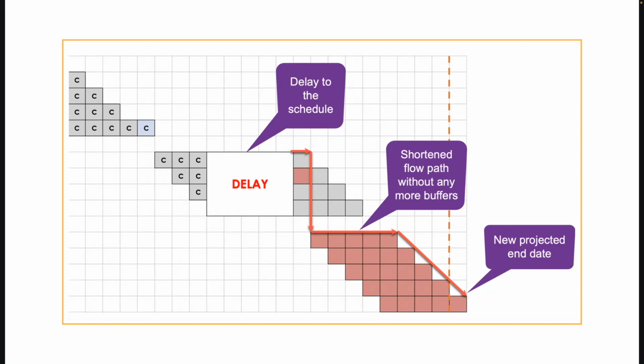So every single part of this is verifiable, so that if I'm an owner, you know your contractor has a legitimate claim to a delay, because delays do not just happen on a critical path. They happen as a part of the phase as a complex system, and that will show up very well inside the Takt production system itself.